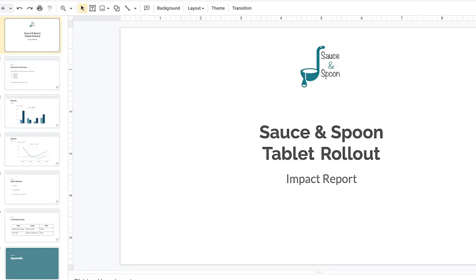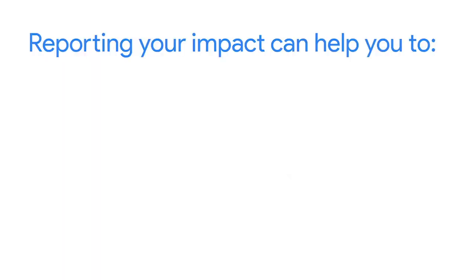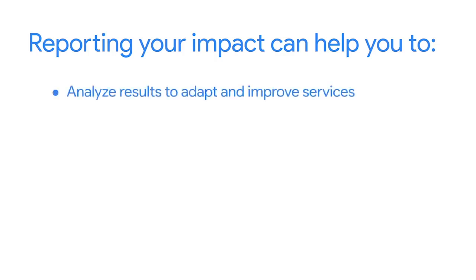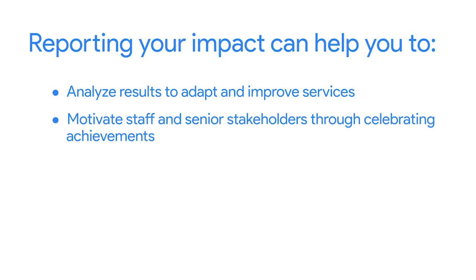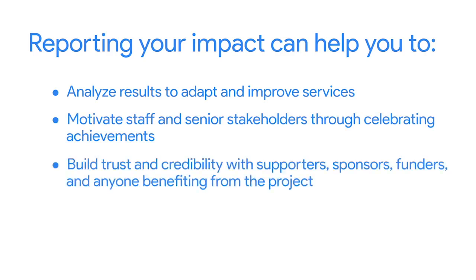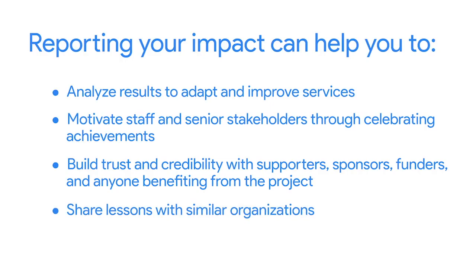Unlike a detailed closeout report that's designed for future project managers or other readers interested in the project details, an impact report is typically created for senior stakeholders or project sponsors who weren't involved in the day-to-day details of the project. Reporting your project impact is key for a few reasons. It can help you to analyze results to adapt and improve services, motivate staff and senior stakeholders by celebrating achievements, build trust and credibility with supporters, sponsors, funders, and anyone benefiting from the project, and share lessons with similar organizations.